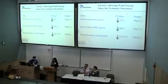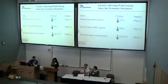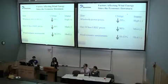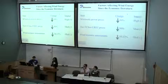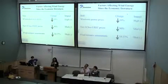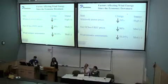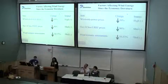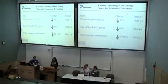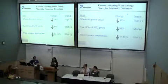Wind resource assessment is an interesting phenomenon that has occurred. When you put your project together, as Katie mentioned, you do your financial analysis, and part of that is trying to determine how much energy you are going to be producing so that you can figure out how much money we are going to be making, so that your investors say, yeah, this is a great project. Well, what's happening is those models that they use to figure out how much energy is being produced, how much money we can make, are turning out not to be accurate. They're 10 to 15% below what they thought they would be.